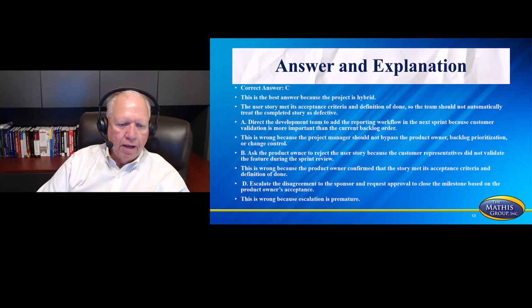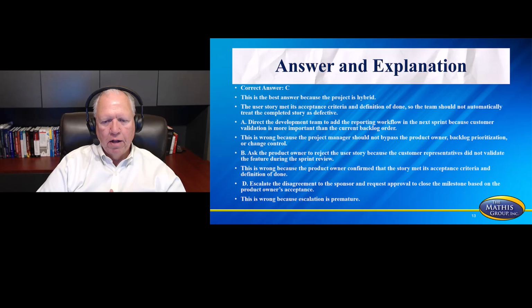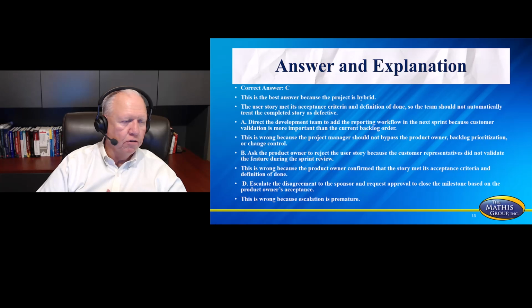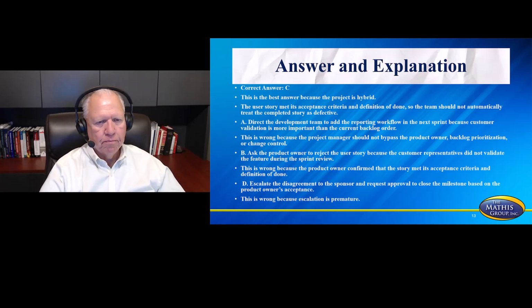What about D? Escalate the disagreement to the sponsor and request approval to close the milestone based on the product owner's acceptance. This is wrong because escalation is premature. It's typically not your best answer on this test.